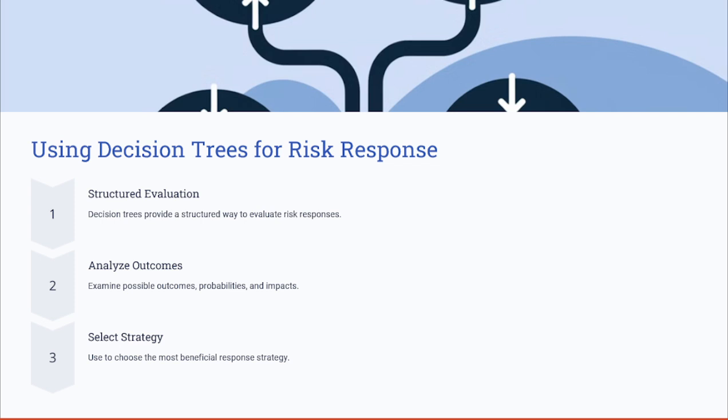For example, let's take here an example of an IT infrastructure project. The decision tree analysis could evaluate whether to develop an in-house solution for a critical system or purchase it from a third party as a third party product. Considering factors like the cost, the ability, and the time of these solutions, you can take a decision to mitigate this risk.